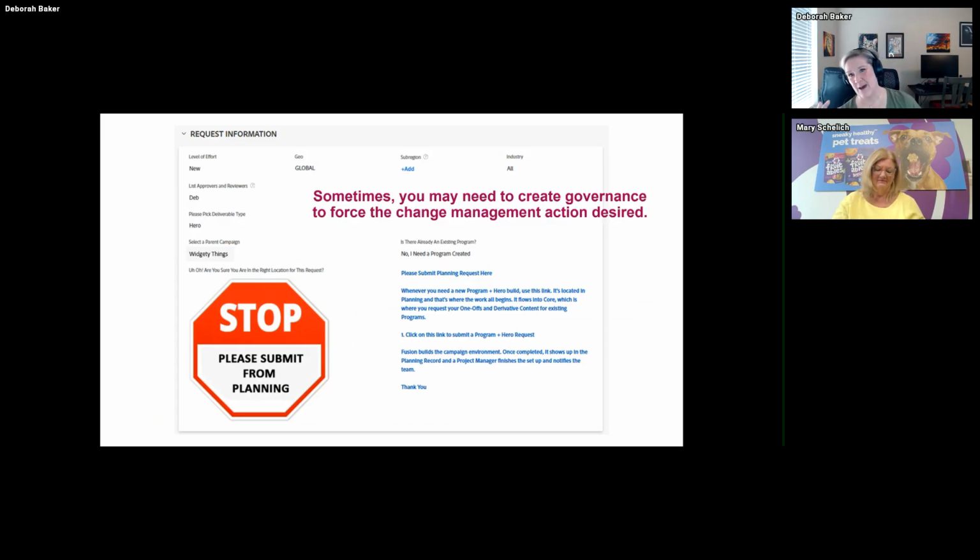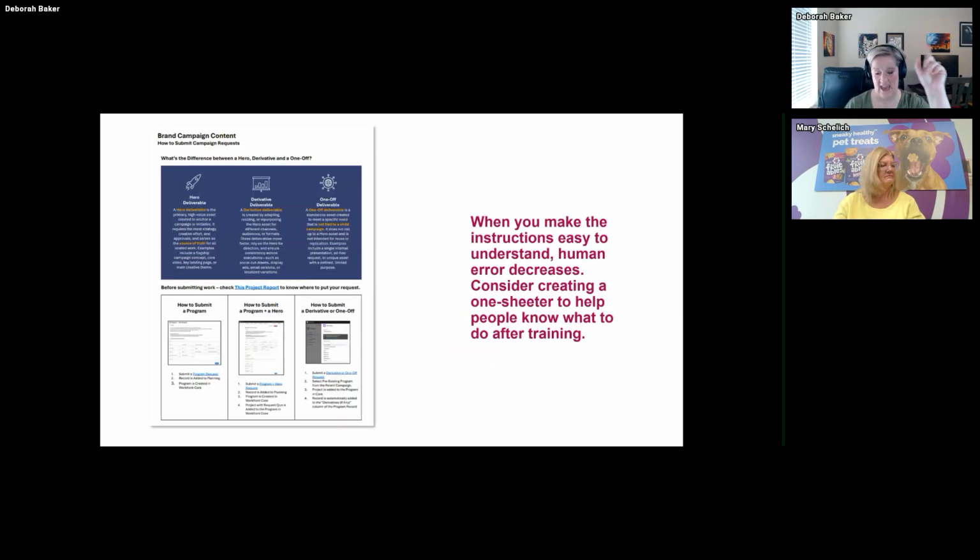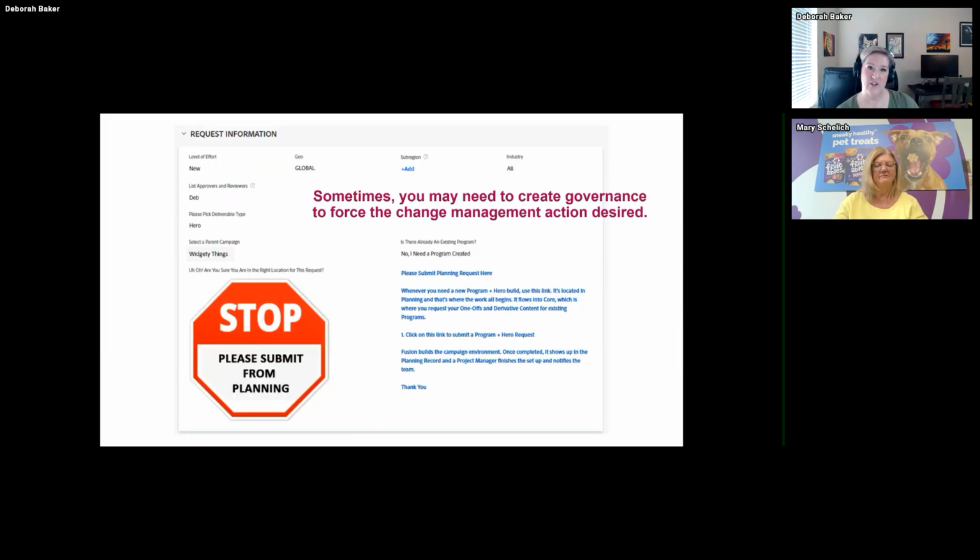And so what was happening is we had, at a core, we made it okay to also request a hero out of there and build a program. And what was happening is it was not calling back to planning. So it was creating that information in core, but there was nothing happening on the other side. And so what we did here is we decided to do this change governance and force the change management in intake. You know, so, are you sure you're in the right location for this request?